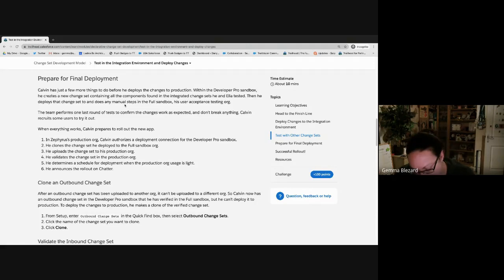Then I had to redeploy all the old custom objects, of which there are about 150 of them. I then had to put all the data back. And then I had to install, and then I had to run checks, and it took all weekend, and it took 3 of us. It was just a huge, huge, huge job.